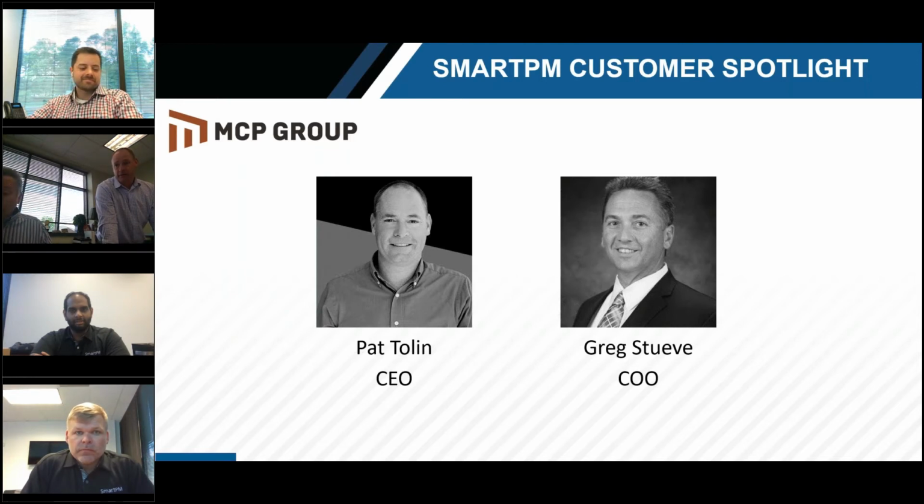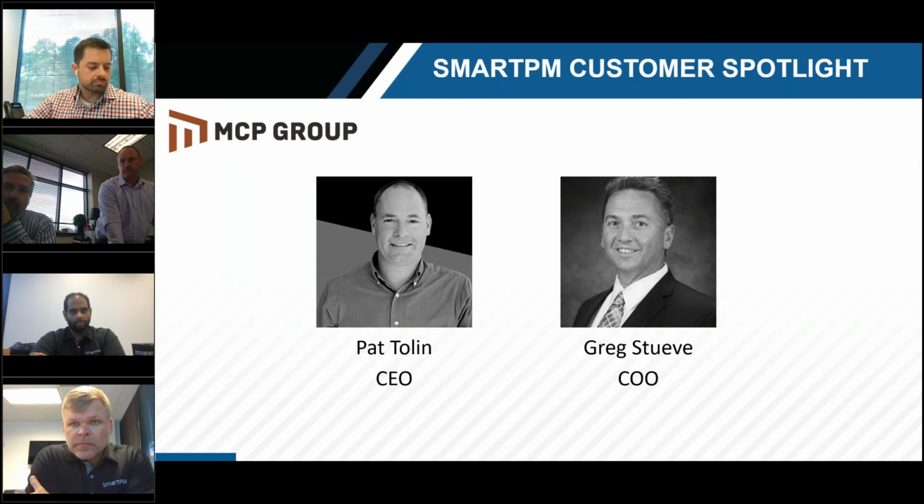Honestly, with this program, we don't have a need to hire anybody right now. Greg and I, like I said, sit down once a week. We spend an hour. We go through every project we have, and most of them are okay, right? It's just you see something that looks like it's going south, and then you dig a little deeper, and it's usually one or two projects, but you get a handle on it early in the project. Then we set up meetings with the project manager and the superintendent outside of our hour-long weekly review, and have 20, 30 minutes to go through it and show them what's going on. We're on Zoom and Teams meetings and everything else, so you can share it wherever everybody's at. Boom, it's right there, and they ask questions. It's a pretty slick deal.